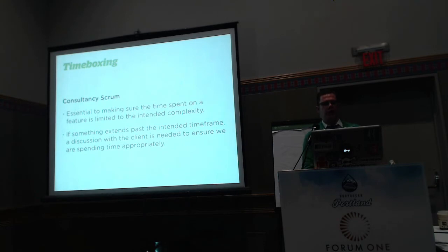the time boxing is less about let's not waste too much of our time figuring something out, but rather let's use a chunk of time to figure out how complicated something really is. So we use research stories, and we time box them in Consultancy Scrum to be able to write more and better stories.